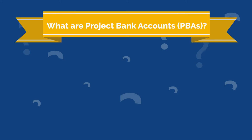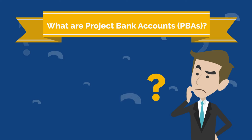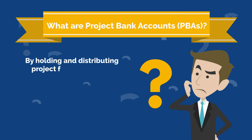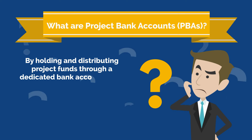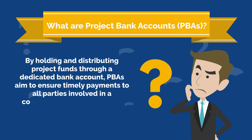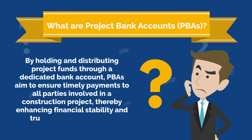Project bank accounts, or PBAs for short, are a financial management tool designed to improve payment security and cash flow in the UK construction industry. By holding and distributing project funds through a dedicated bank account, PBAs aim to ensure timely payments to all parties involved in a construction project, thereby enhancing financial stability and trust within the industry. This video explores how PBAs work, their benefits, and their implementation within the UK construction sector.